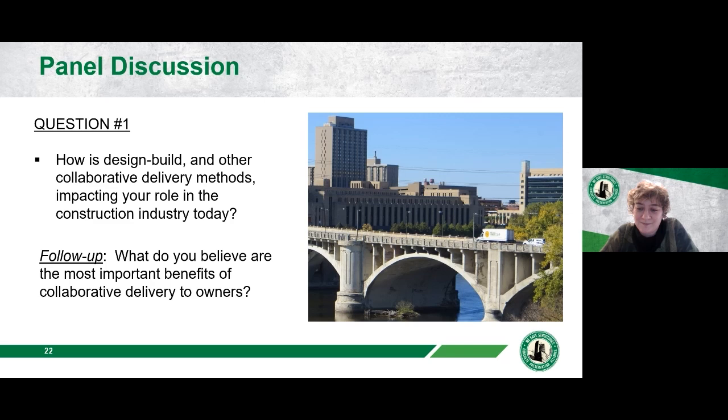When we were chatting earlier with Anna, she had brought up those words, risk register. And so in Florida, for example, when you go after a design build project, once you are shortlisted, part of that process will be in the completion of all your documentation will also be the completion of the risk register, and then the assigning of dollar values to those things. And the other thing that Anna taught us very well is that risk gets priced, right? So those things will be assigned and mitigated as best we can see between the owner and the design build team. The owner would then understand the reason for the cost associated with that risk register, and that would help him in evaluating his best value approach.